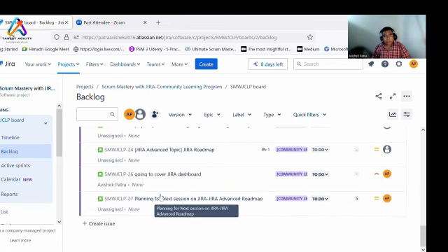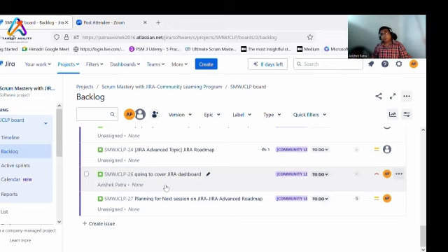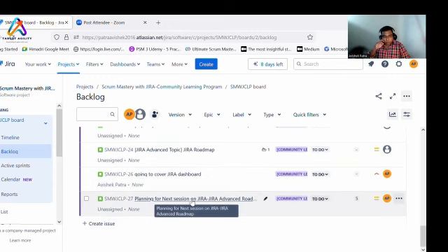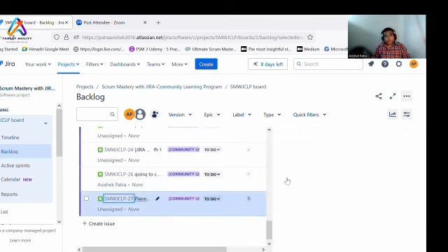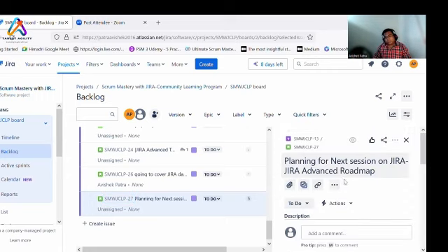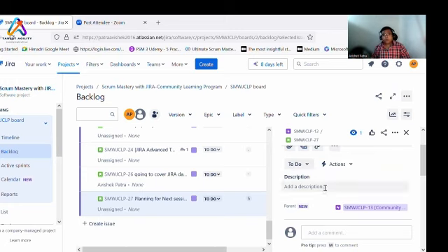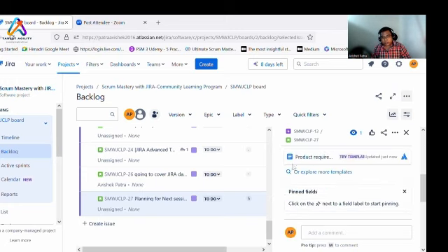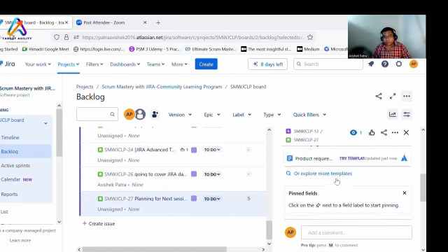Like this way, team members can come together in the refinement session. They can understand the next sprint's objective. Based on that, you go for a discussion, you create a Jira ticket, and then you slowly start writing the description of whatever work you are going to do, and acceptance criteria. If you want to add any details, you can add it here, and links of any Confluence pages.